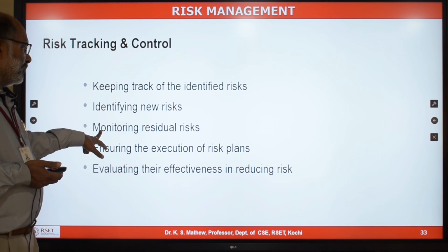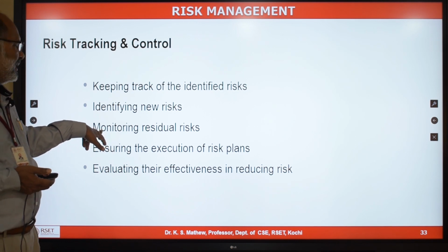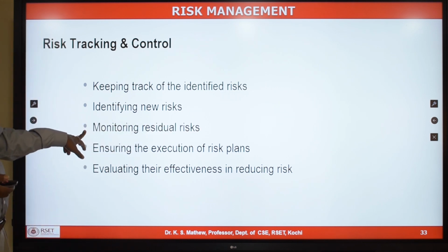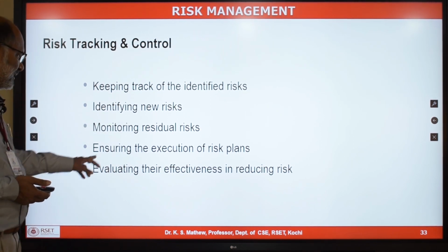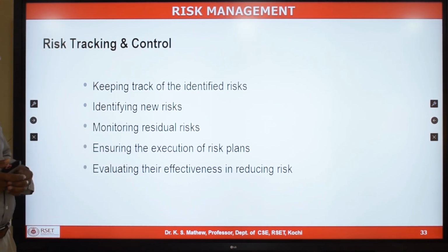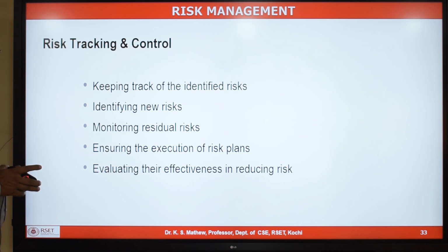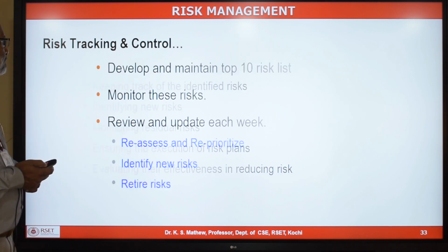Monitoring the residual risk: even after taking mitigation steps or avoidance steps or transfer steps, there will still be some risk remaining. So monitor those residual risks, accept those risks and plan a contingency plan. Have a contingency plan to address the residual risks which are accepted. Also ensure that the risk owner is executing or initiating the action plan for the risk whenever it occurs in the project. You should also evaluate the effectiveness of the action taken after executing a resolution action when the risk occurs. Whether the action was effective in reducing the risk has to be analyzed.